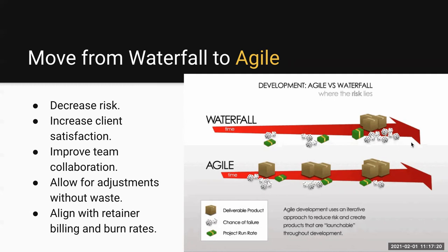Now with Agile, we instead focus on producing something iteratively over time. Risk is a little bit higher upfront, but the cost is consistent across the board. So what this does is it gives us the ability to say, if there's a lower priority feature that comes later on, we could theoretically pull it, change it. Either way, if it's something that might require a little time to explore and there's still something to build immediately, we can build something immediately and have it functional, have it usable, and there's value to that investment.